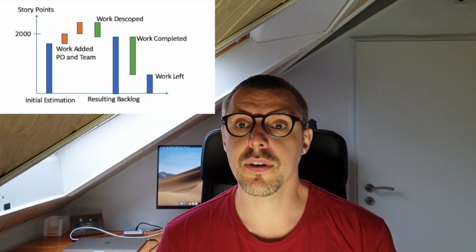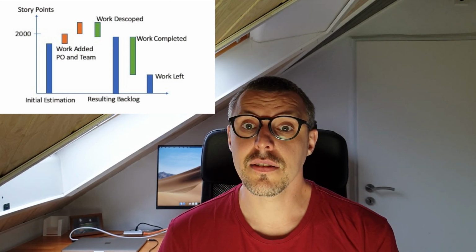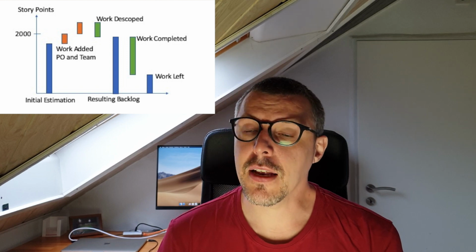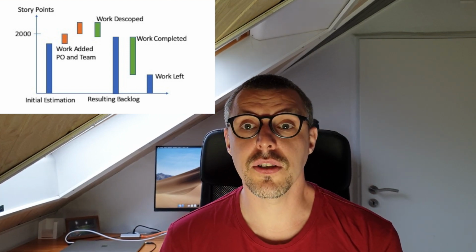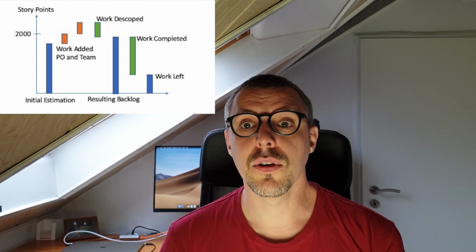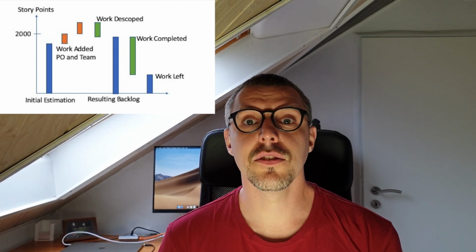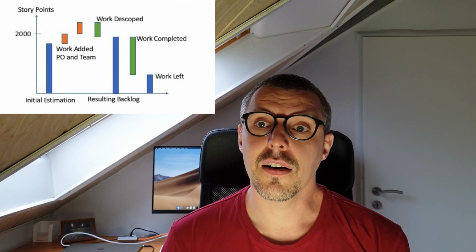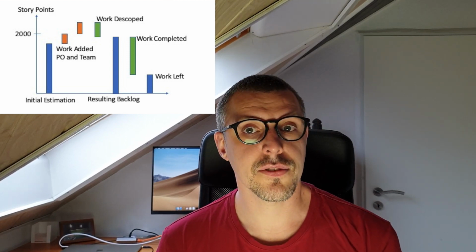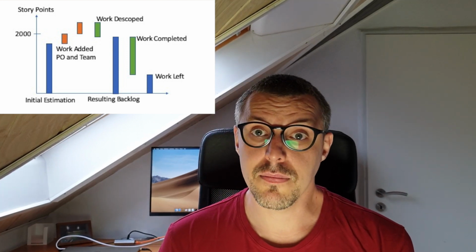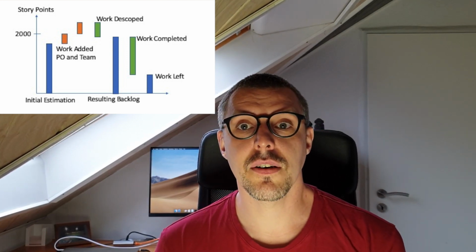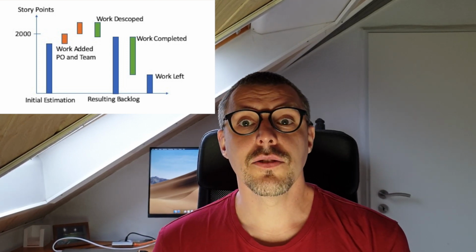The third tip is using a chart management actually knows from financials. It is telling you, from a baseline backlog, what work was added during the course of the project and which work was removed or descoped. It also tells you how much work was already done by the team and how much is left. So you can see where you are in the project, where the effort came from, and if there was effort added or removed. All of that you can see quite easily.